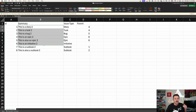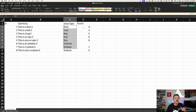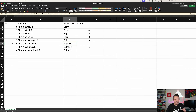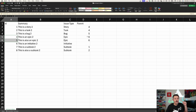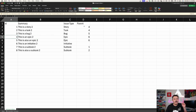I then have the summary — the name of that ticket — and I have the issue type. Most importantly, I have a parent field that is mapped with a number, and that number corresponds to the appropriate parent in that first column. So this initiative is issue number six, and it is going to be the parent of these two epics — these two epics will have that six in the parent field.